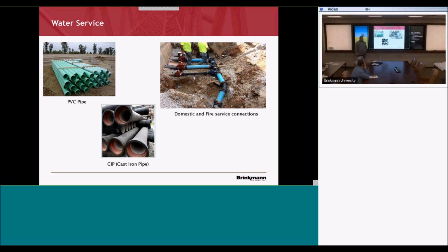And you need to know where you're getting your water and electric for it. Some municipalities are going to charge an extra meter reading fee, some won't. So if there's an extra meter reading fee for the irrigation, if it's $40 a month, well, is it even worth having that in there? Those are discussions you can have up front with the owner.